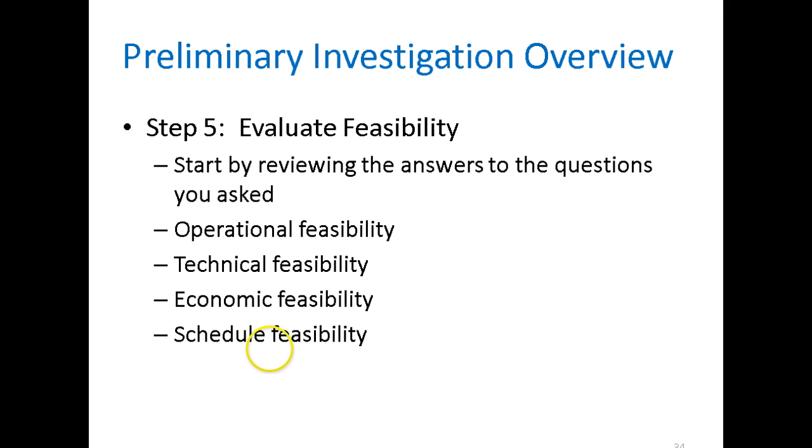40 hours you can multiply by the pay rate for that particular level of person. They're an expert, or they're an intern, or they're middle-of-the-road average worker. You can estimate and assign hour pay rate times hours gives you schedule and some economic costs in the schedule. And that's all built into these programs. First you lay out a schedule, then you can go back and start putting in resources, giving them names, or